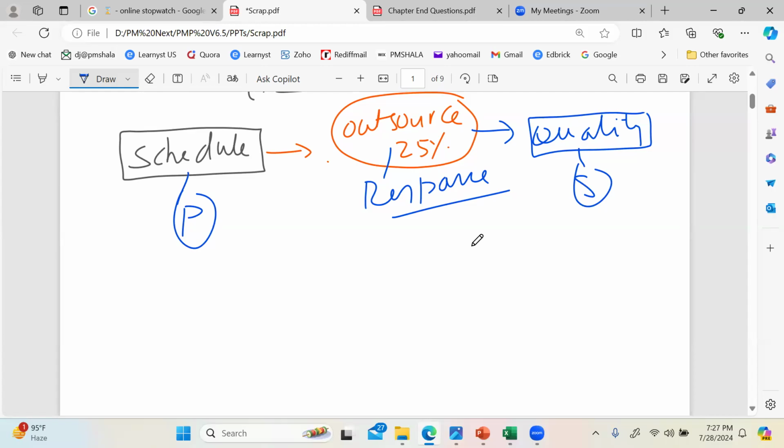So what is the takeaway then? Takeaway is that whenever you finalize risk responses, you should always give consideration to any, does it result in any secondary risk? And if so, what is the quantum of that risk? Let's say, for example, your secondary risk happens to be more critical than the primary one. Then what? Big question on your response planning, right? So that's primary and secondary.